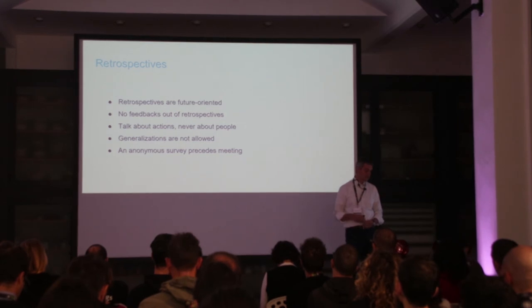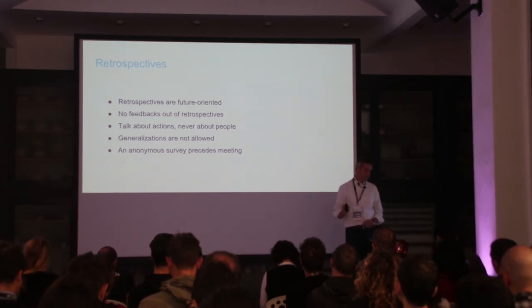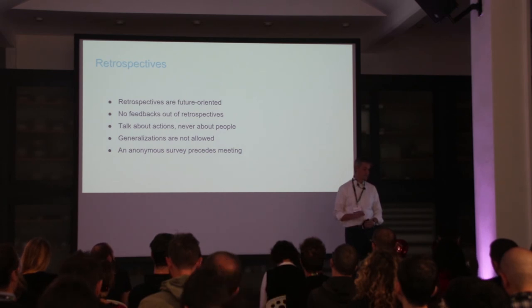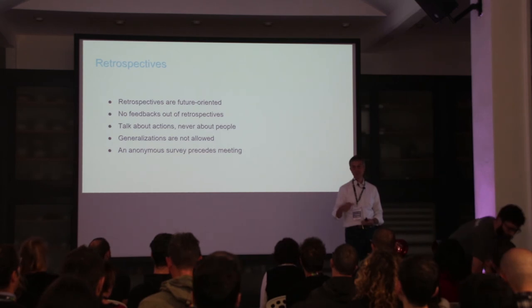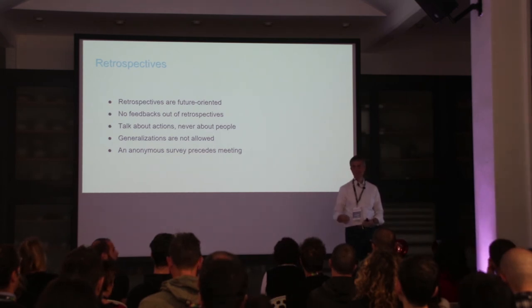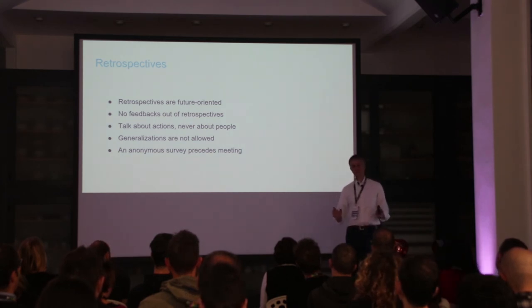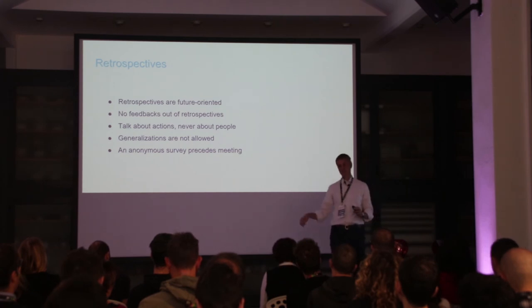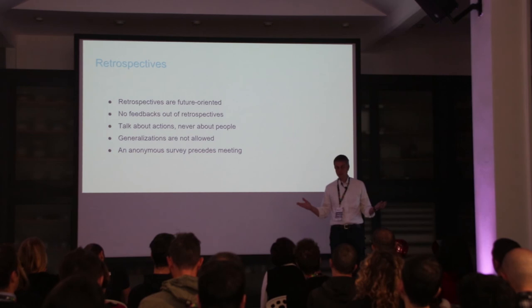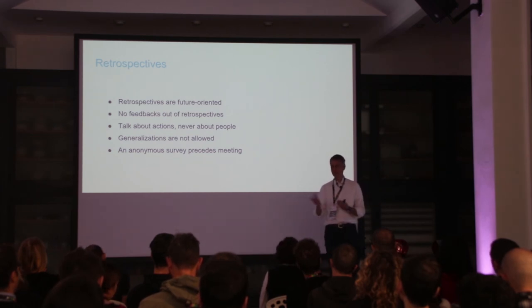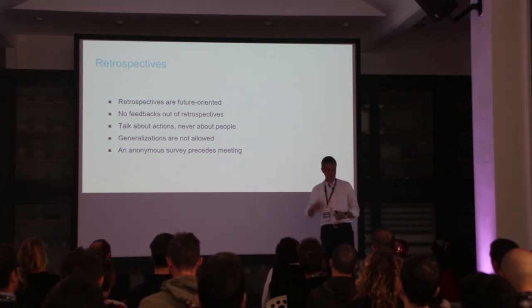And we suggest to avoid generalization. We always ask the members of the team to fill an anonymous survey first. We prepare that with the other heads of departments. It's an anonymous survey on Google Form, and then when everybody has answered the survey, we print the results, and they are anonymous, and the team gathers to discuss the results of the survey.